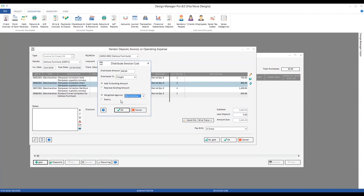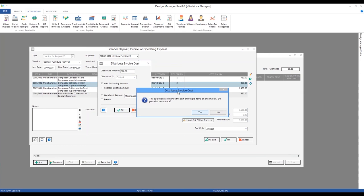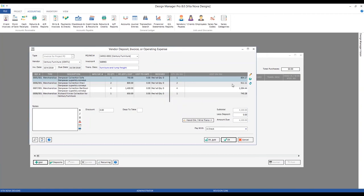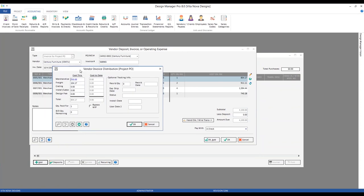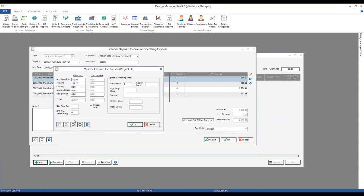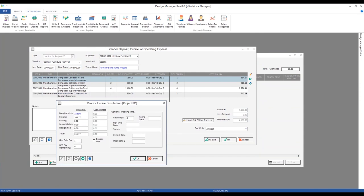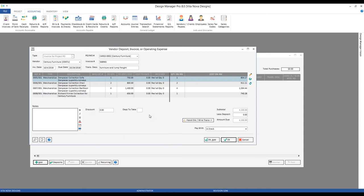When we weight against merchandise, the higher the cost of merchandise for each component, the more freight it will get. Clicking OK, Design Manager warns us we're updating costs — and notice just like that our cost on invoice for each one has changed proportionately. The sofa got a little less freight than the chair, the barstools got the most freight at just under $200, while the table got less than $100. Depending on the cost of the merchandise of each component, Design Manager distributed that freight — a very logical way of handling a lump sum.